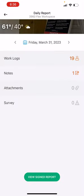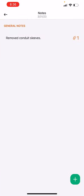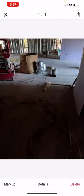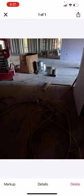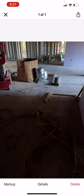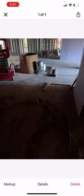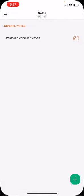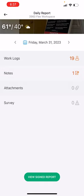So that's pretty straightforward as to how the work logs work. And then when you're done, let's go to notes. So notes, this could be anything random that maybe I personally did. Or just something that may not necessarily pertain to a particular trade. But that's something that I want to keep separate. So usually I'll put my inspections within the notes. So I'll go to a note. And then I'll put, electrical rough-in inspection. And then I'll put a status or comments as to what happened during that inspection. So for this one, I removed some 4-inch conduit sleeves that were coming out of the floor that needed to be removed. You can see those right there. So I was letting the owner know that these got removed. And now all we have to do is go back to the main electrical room and pull all that optic wire out.